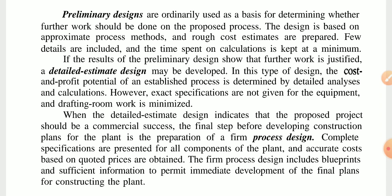In the detail estimate design, the cost calculations and profit potential of the established process are determined by detailed analysis and calculations. However, exact specifications are not given for the equipment, and drafting room work is minimized.